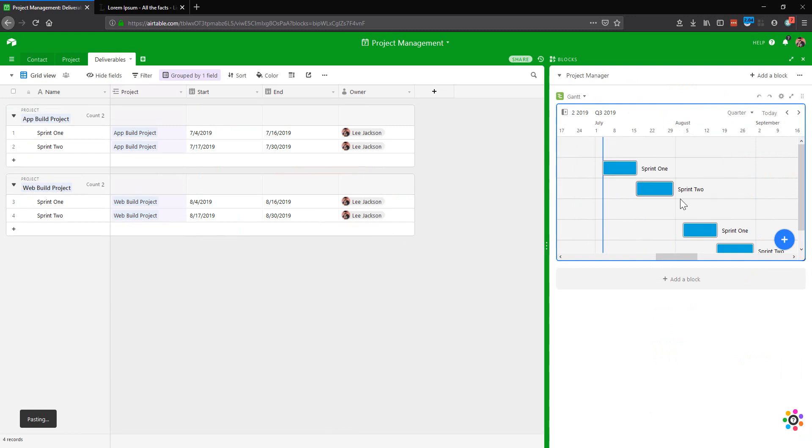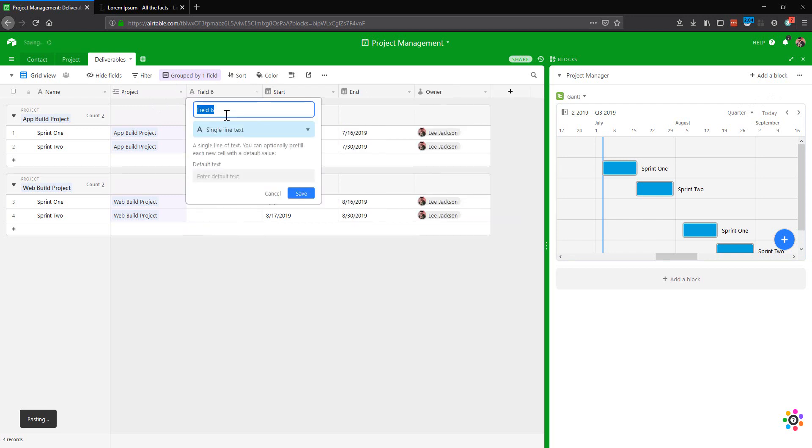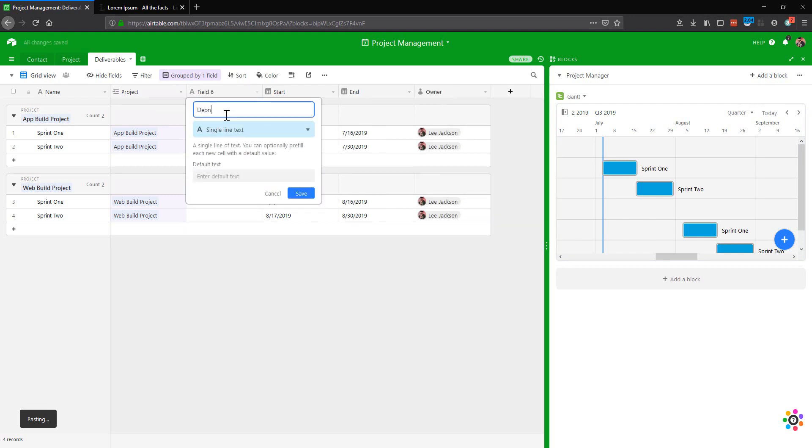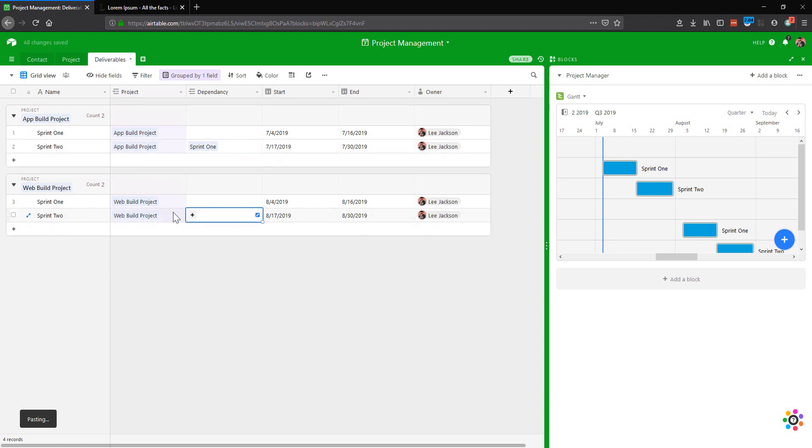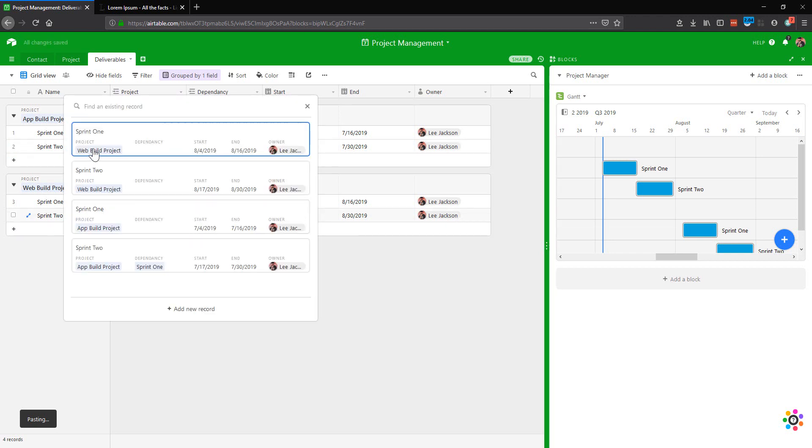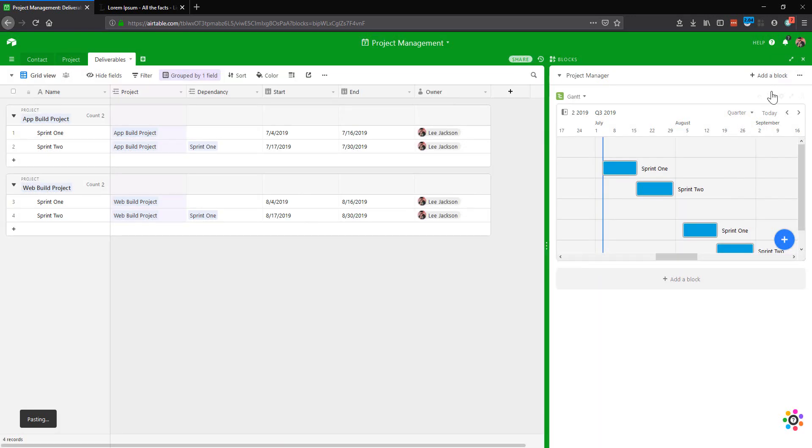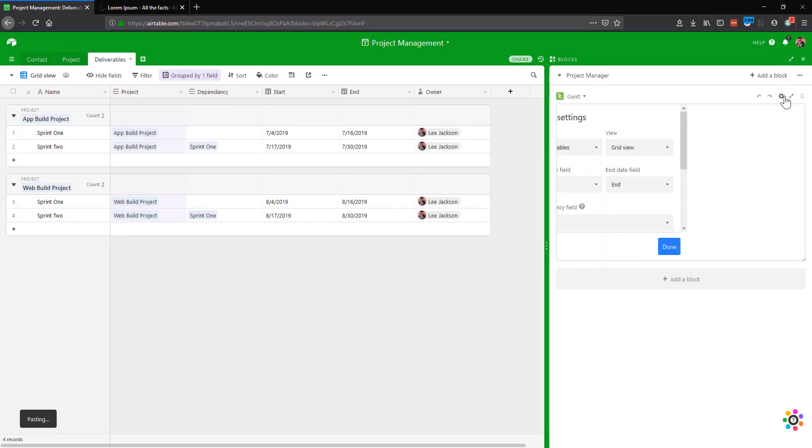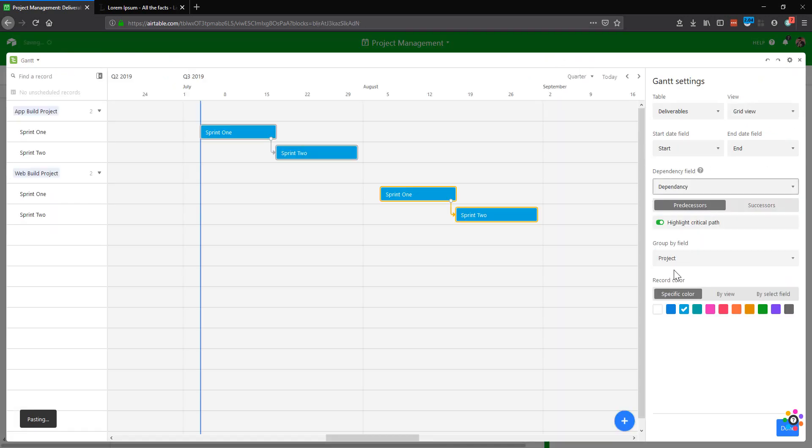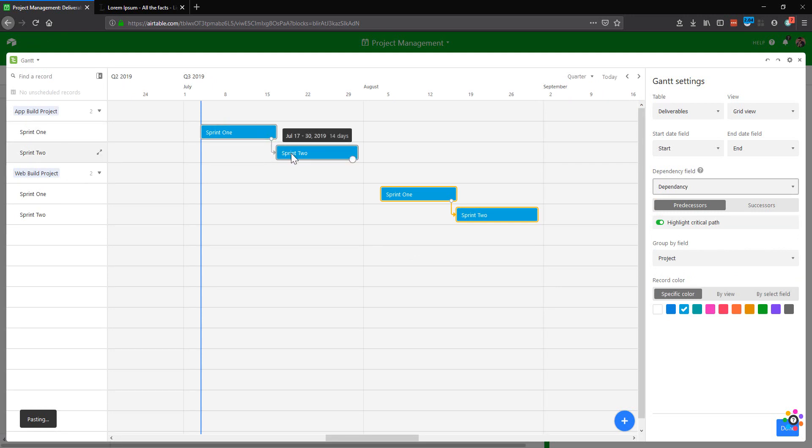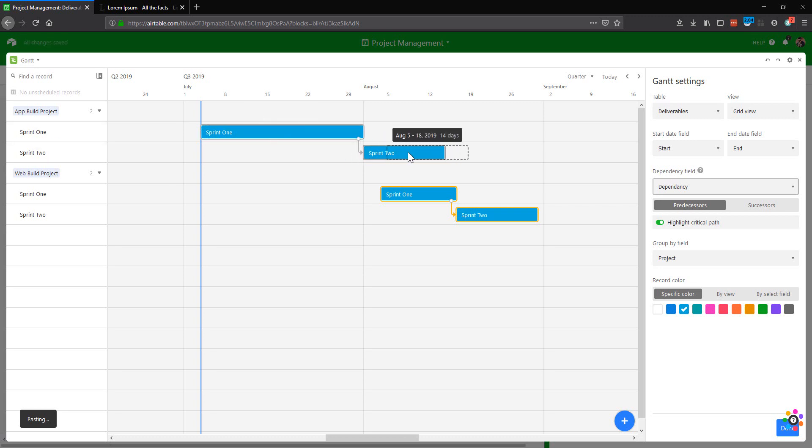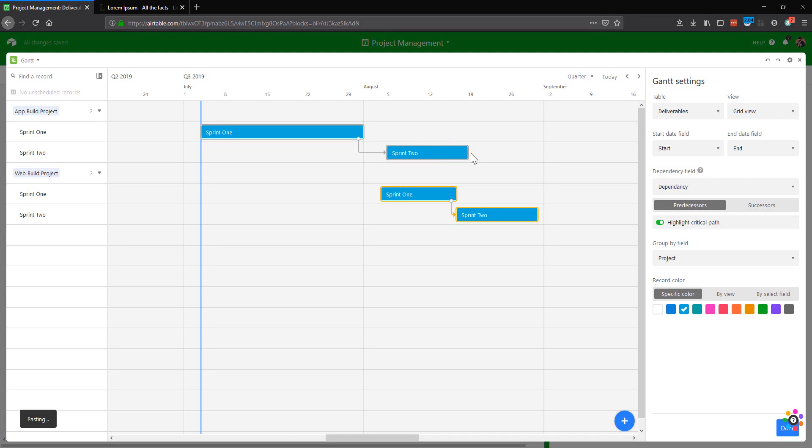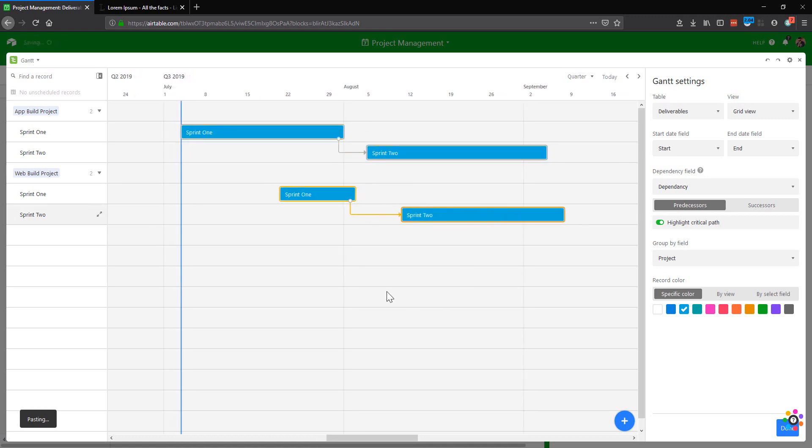What I can also do is create what's called a dependency. So I'm going to create a new field here. So let's insert left. I will click there and I'm looking for the app project and I'm saying that this is dependent upon sprint one happening. And then for here, sprint two is dependent on sprint one of the web build project happening. So if we then open up this element here and then we tell it that the dependency field is the dependency field there, you can now actually see these particular dependencies as well, which is super useful. And then in this view, this also allows you to manage the length of time. So if you know sprint one is going to take longer, we can actually now elongate that, we can push this on. You can change the sorts of views you have, like any sort of Gantt chart. Maybe I'll move this over here. Maybe there might be a bit of a holiday break and that might be extended. So this is giving you those sorts of control.